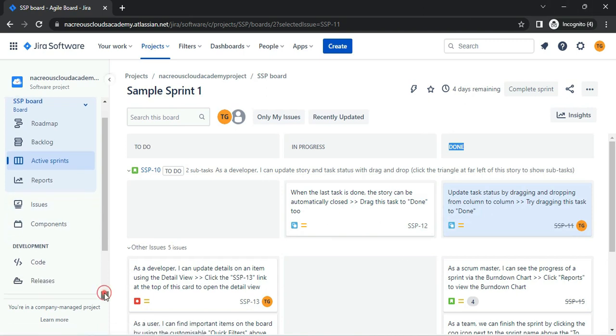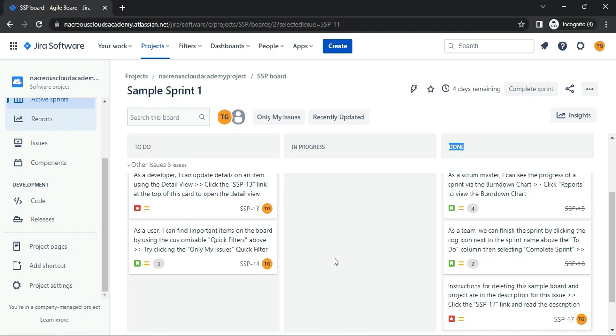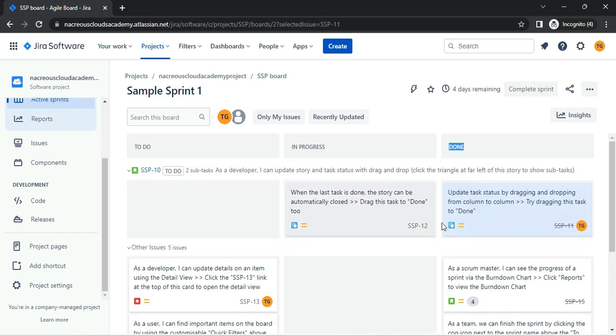If the team is not able to complete any of the tasks within the sprint for various reasons like being blocked due to external dependencies not in control of the developer, or no proper estimates provided to the task during the sprint planning, all such issues will be spilled over to the next sprint. Developers try to avoid such occurrences to maintain good sprint health and avoid future delays in achieving the project roadmap. The Product Owner can also add new tasks to the sprint in the middle of the sprint and deprioritize other tasks if any critical business requirement arises.